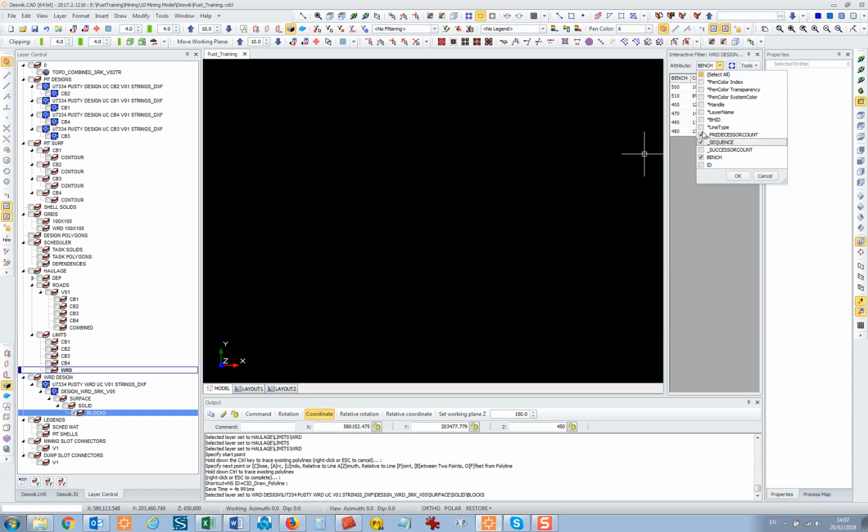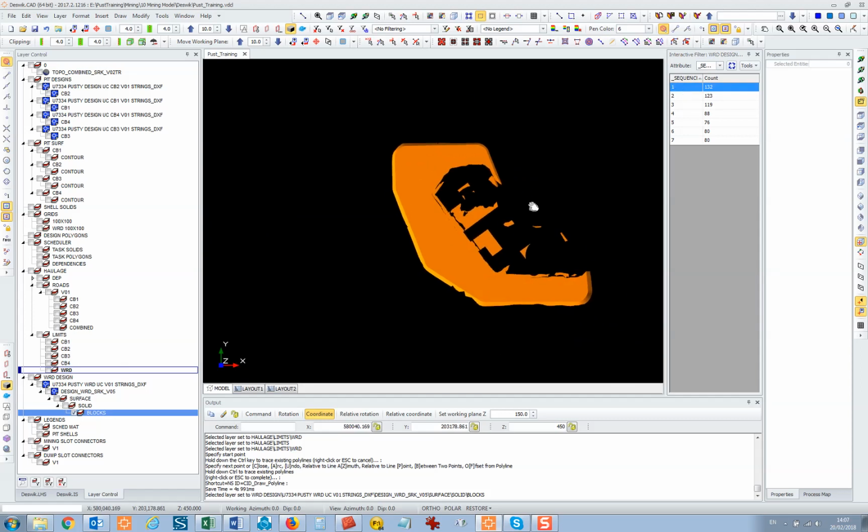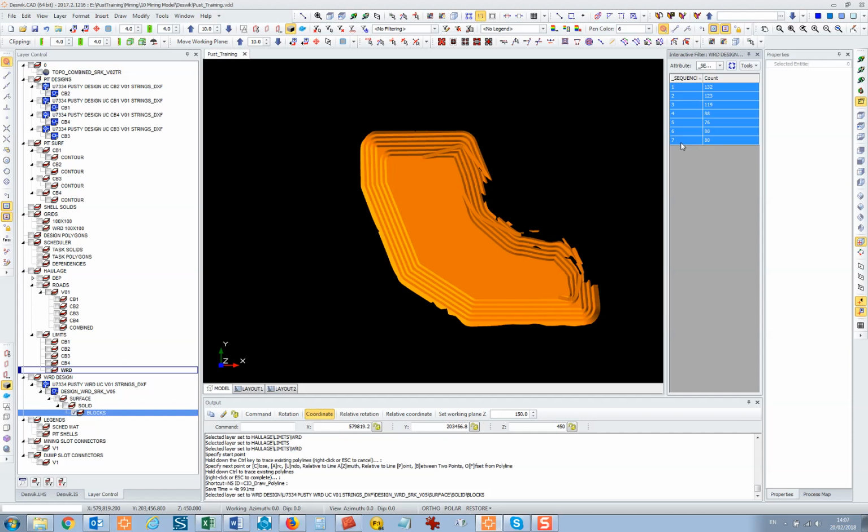If you order the sequence and then click 1, see that has to be built, you hold down control. 1, 2, 3, 4, 5, 6, 7. So that's telling us the order that the blocks have to go in. For example, that stops the top bench from being dumped before the bottom bench, basically. And that's as simple as it has to be. So if you click close now.